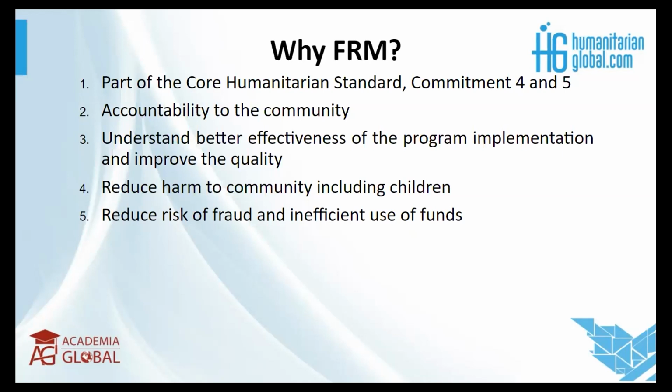And then number 5 is once we have feedback mechanisms, we are able to reduce risks of fraud and inefficient use of funds, because remember, we are accountable. The community is able to hold us accountable, and we have already communicated, for instance, if the project is going to provide water trucking, and we have already explicitly said that there would be X number of trucks, and they could be coming around in X number of days in the period of the project, which could be 6 months or so. And so the community knows and they are aware, and they will definitely be there to see that that is what is done. And if not, why, and we have to address these questions.